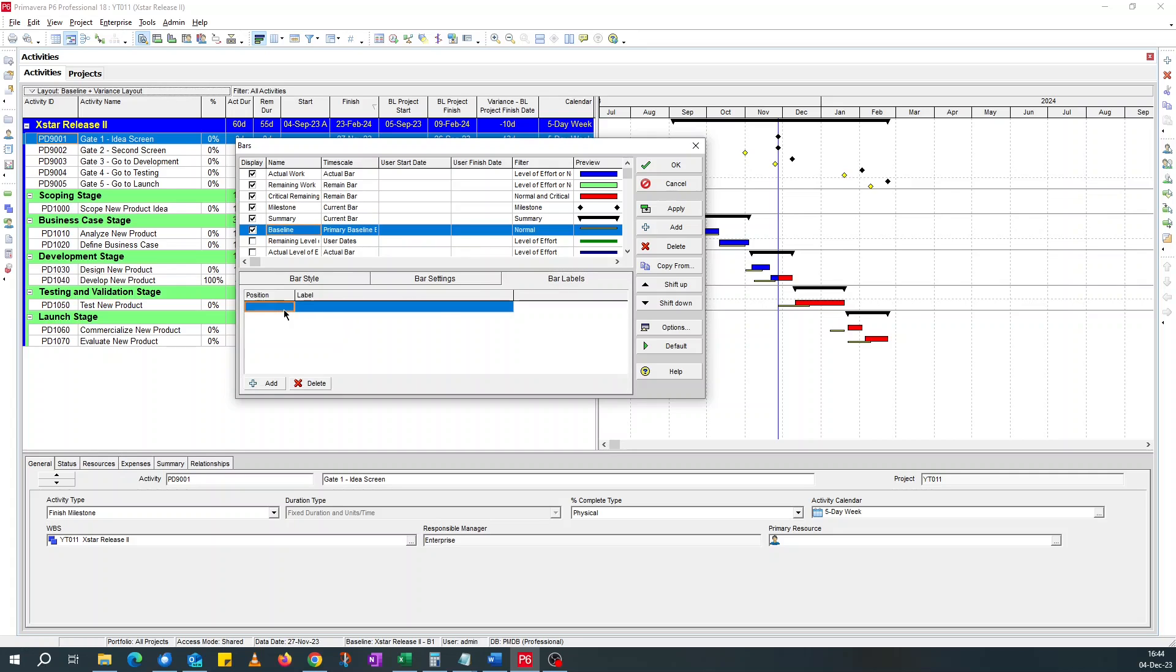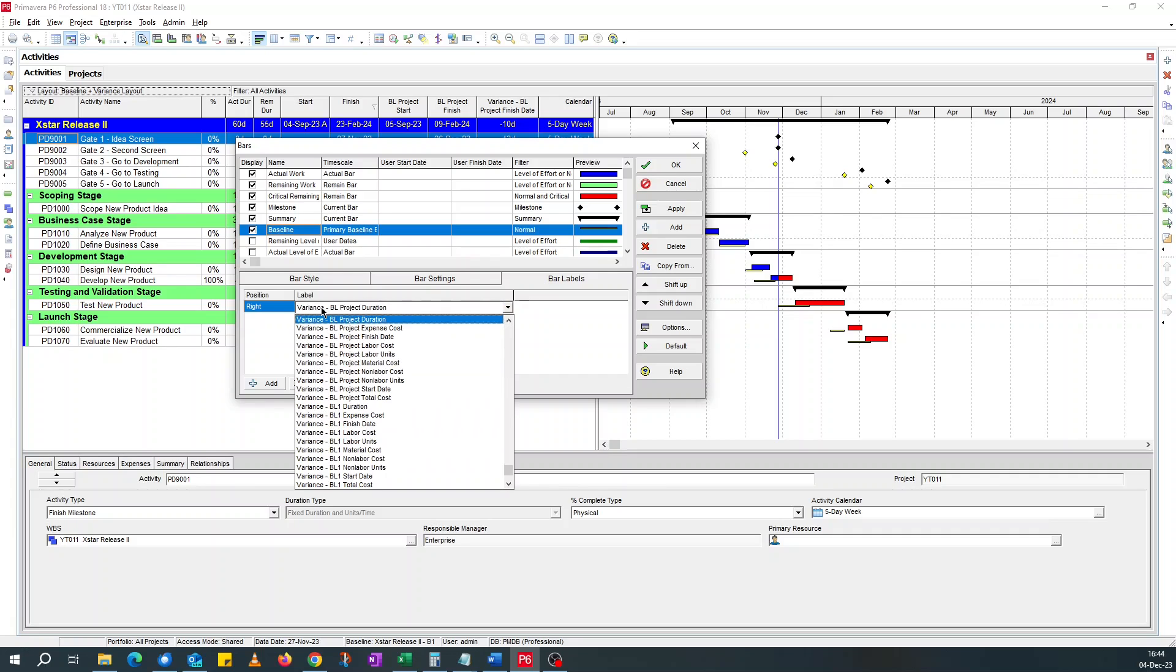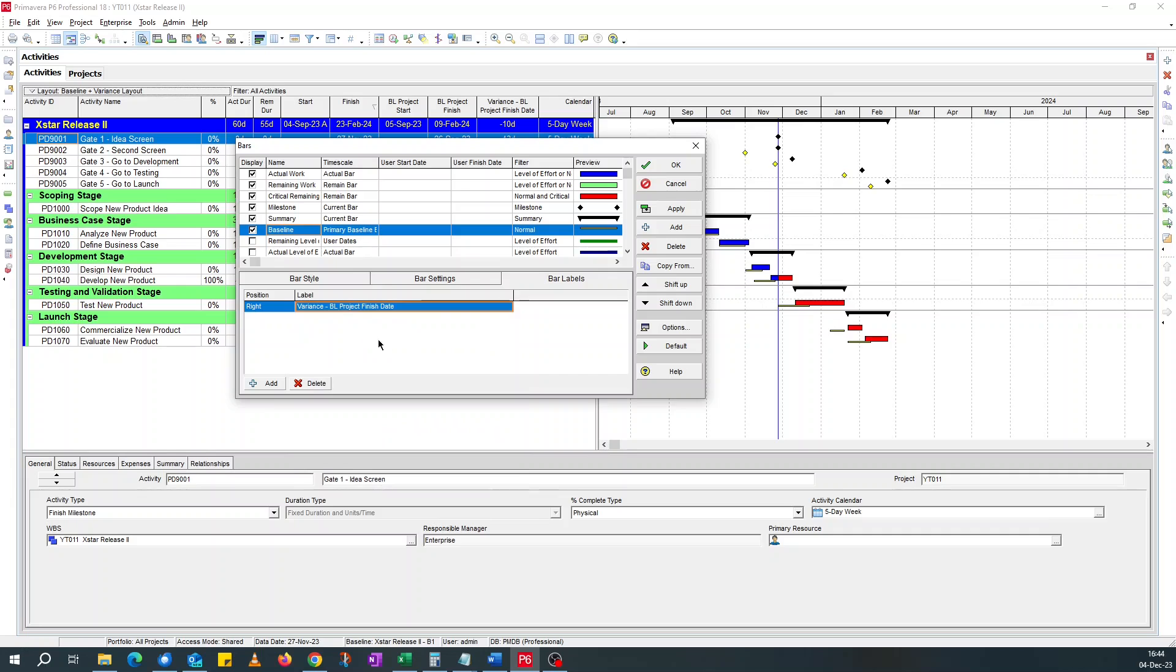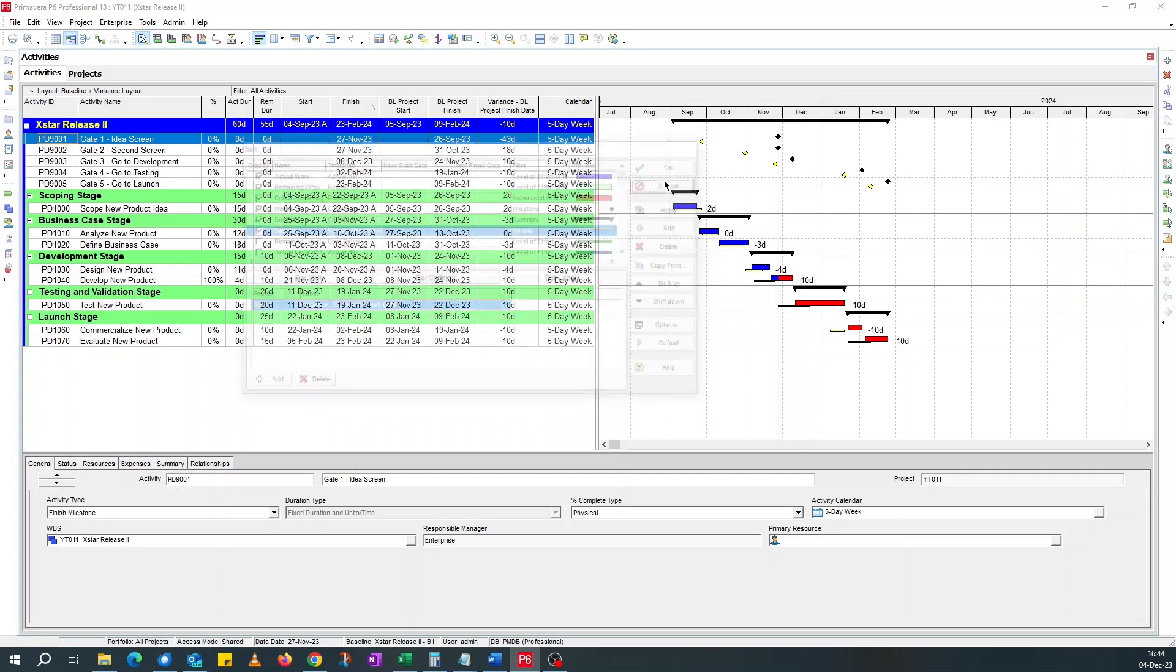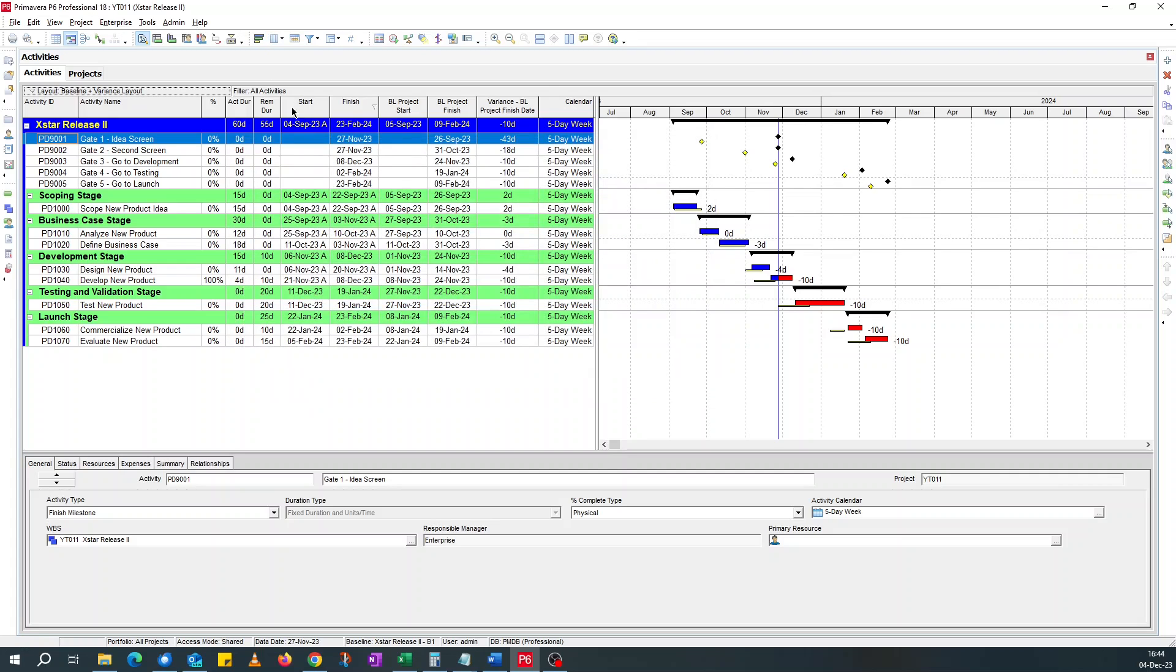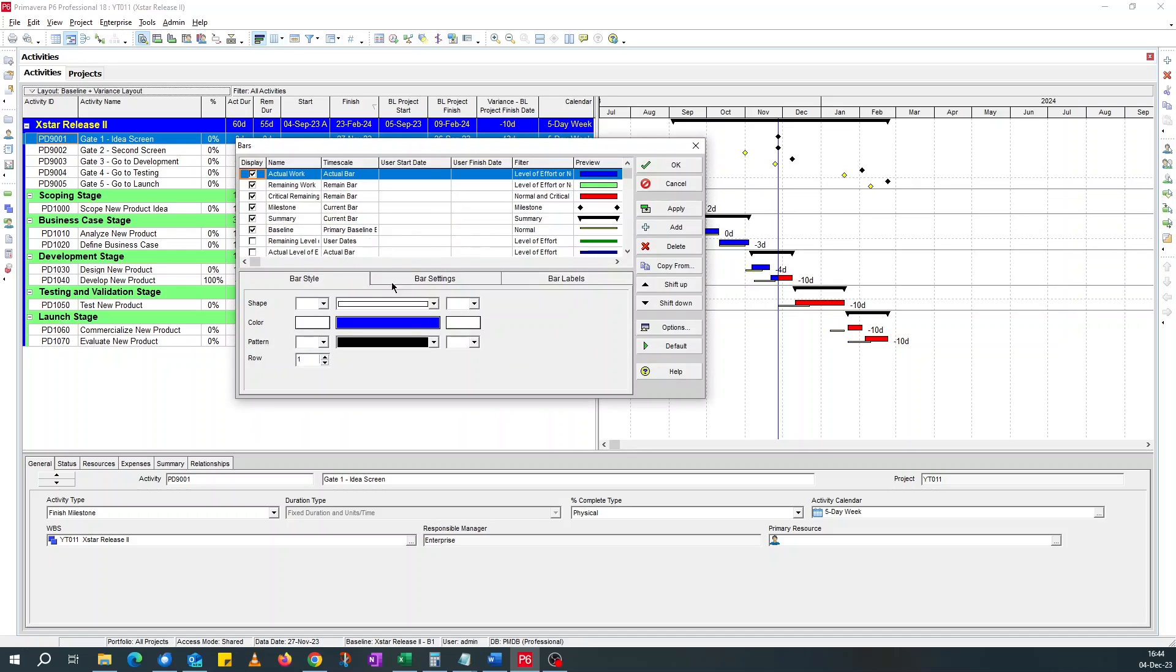add to the right of it, you look for variance, baseline finish date. If you apply, it just shows you minus 10, shows you how much it's late. You could adjust this up a little bit. I'll cancel this and delete that for now.